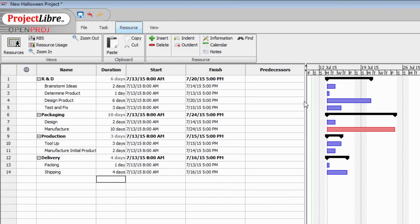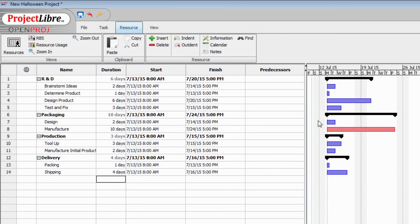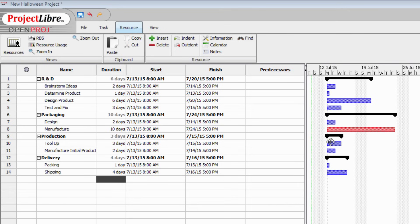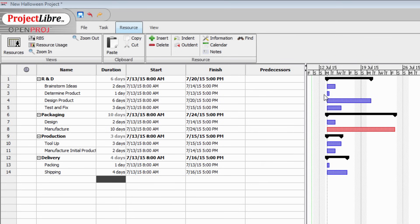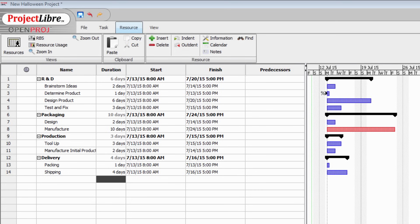So now our Gantt chart is starting to take shape. Each one of these items now has a bar that represents how long it's going to take. But of course, everything's not going to take place on Monday next week. When we're brainstorming ideas, we can't be determining the product because we haven't brainstormed the ideas that will help us determine what product we're going to produce. So there's a dependency here. Determining the product can't take place until we've brainstormed ideas.